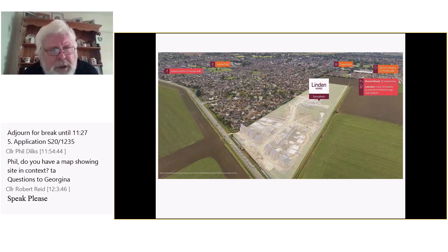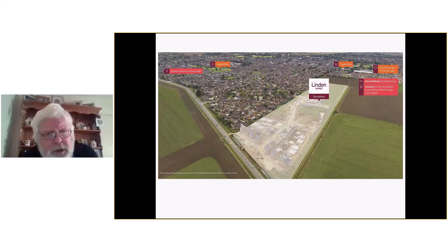If so, would you be willing for that to include on-site wheel washes, undertakings to remove mud on the roads dumped by your machinery, and would you be willing to agree to a condition that from now on you'll use the excellent new access that you've provided into the site directly from Lynchfield Road that Phil described as the main access into the site, rather than using the access down Birchnell Close and Campion Drive, which is through the neighbouring established housing development, which has caused inconvenience and some conflict with local residents during Phase 1 building. And also, I understand that the Sorrel Close area, just further west from Birchnell, is currently suffering from... I'm awfully sorry, did you stop me?